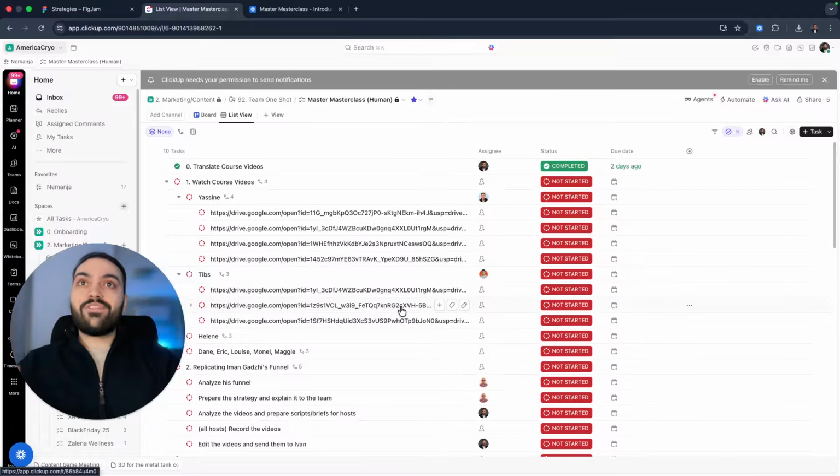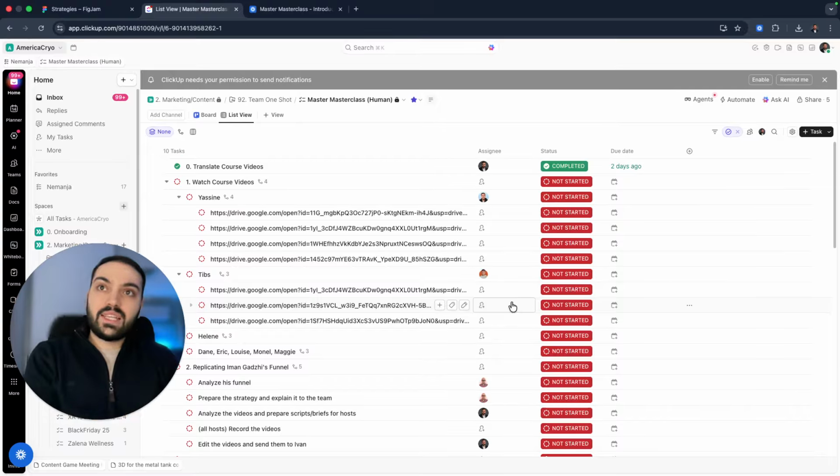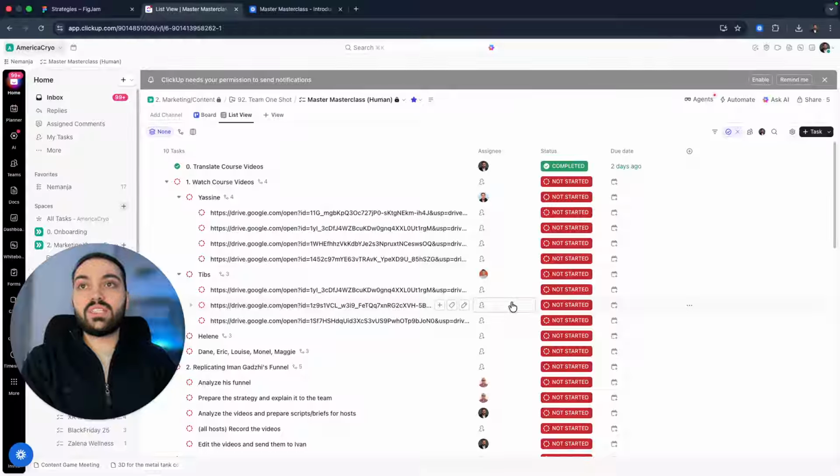So once we define all of these, we need to really think about every single step in production in order to complete this to satisfaction. That comes with the preparation phase, the production phase, the testing phase. We need to go through the customer's journey multiple times in order to understand whether everything is running smoothly for our customers and leads. And finally, we need to think about the post masterclass steps.